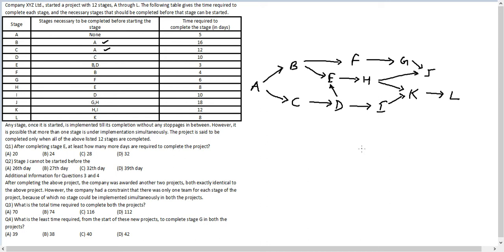This diagram enables us to see the dependency of every stage on every prior stage. We also have the times mentioned, so let's record these times appropriately. Since these are durations, recording them as raw durations makes information capturing difficult. Instead, write it as the day the process started and the day it ends.